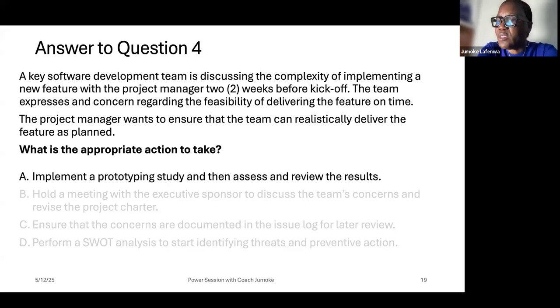And you know what the kickoff meeting is? The kickoff meeting is where you meet with the key people. You let them know, so they are aware. So within the project team and the external team, maybe within the other functional units within the organization, they will now get to know that this team is going to manage this project, and this is the vision or the objective of the project, and these are the team members.